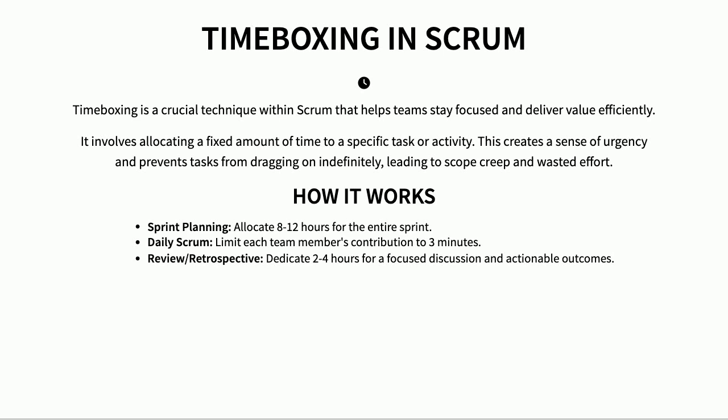This isn't just about being efficient, it forces the team to prioritize and keeps things moving forward. We use time boxes in all sorts of meetings, from sprint planning, where we decide what we'll work on during the sprint, to our daily stand-ups, where everyone gets a quick chance to share what they're working on. And then, for reviews and retrospectives, it helps us have really focused discussions and get concrete action items out.